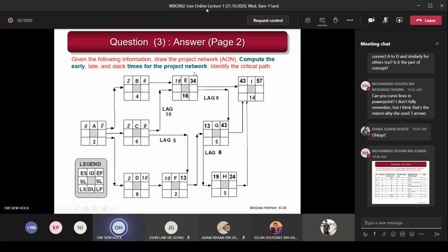I finish this 9 days later, so I have to add 34 plus 9, which is 43. Which one is larger, 18 or 43? 43. So always remember, going forward, you always take the largest. You take 43 instead of 18. You understand now? Okay, I understand.